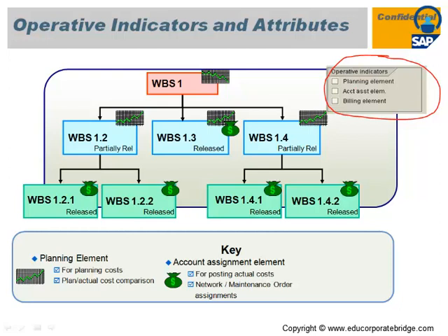For that particular sales order, if you want to capture that WBS, your billing element tick is mandatory. If there is no billing element tick, the system will not allow you to capture the sales order against that particular WBS. That is the integration point of PS and SD. So always the billing element tick will be there if you want to capture that particular WBS in a sales order. These are the three important indicators available in the WBS.